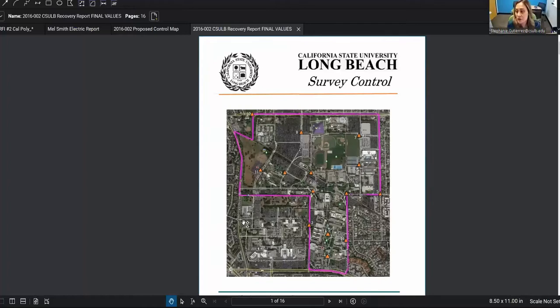Well, the specifications call for the coordinates. It doesn't say that it has to be done by a licensed surveyor, but if you look at the coordinates that are requested, that kind of thing is typically done by a surveyor, or maybe a student who's studying surveying or somebody who has that kind of experience. But the coordinates are listed in our specifications. Okay. A lot of these superintendents are self-proclaimed surveyors, so I guess we have to pay a little bit more attention. Yeah, so they give us good as-builts.